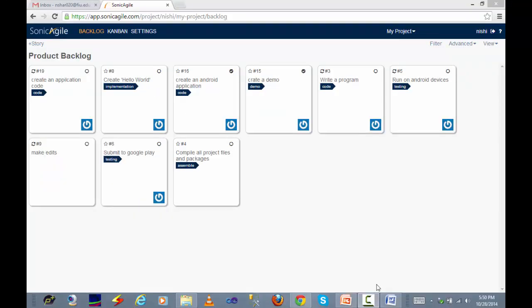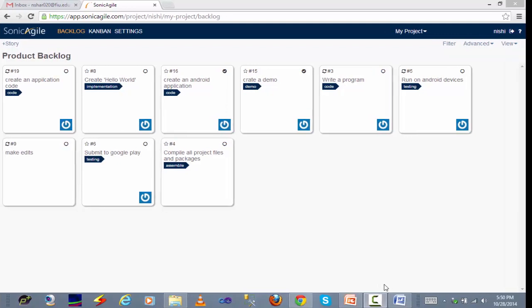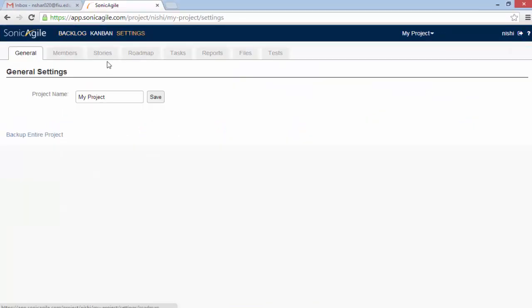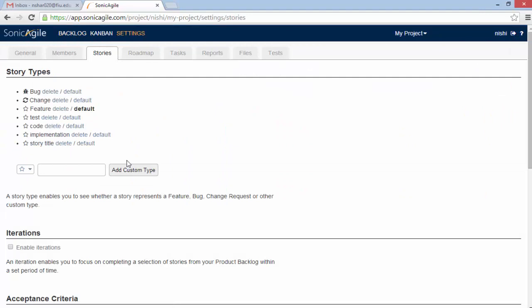The next feature is iteration. It is an optional feature. If you want to enable iterations, you need to go to settings and then stories and you need to click on enable iterations.